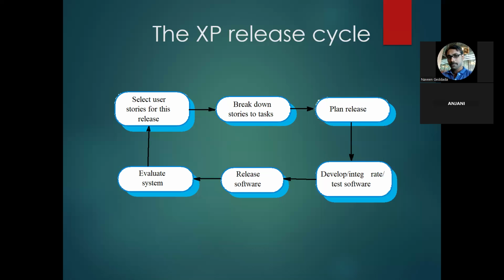In the same story, you will create another task for validations of the username and password. This task is assigned to the developer who will write the code to validate the username and password as per the client requirement. And we will be creating a third task, for example, validate the login screen, which happens after completing the UI design and the functionality of validating the username and password.